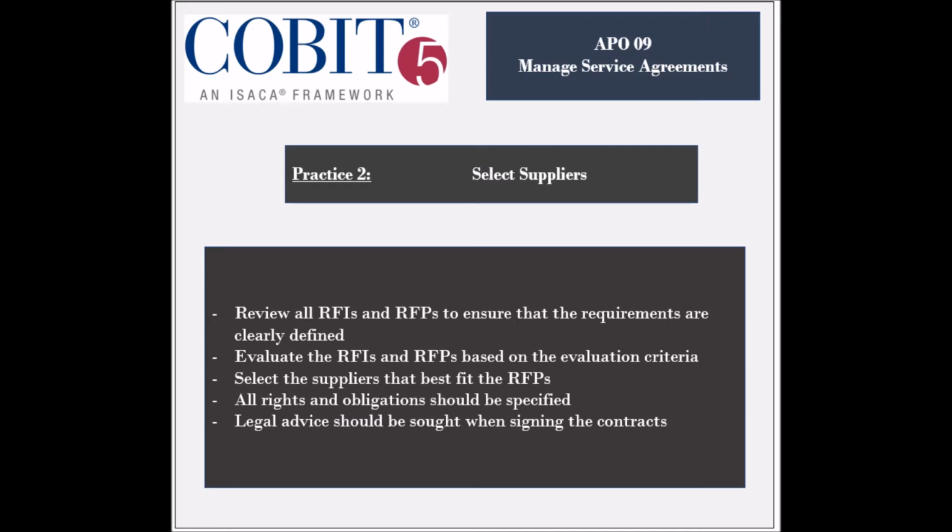The RFI and RFP documents should be evaluated in regards to the established criteria, along with verifying the references provided by the suppliers. The supplier that can best fit the RFP should be selected, the contract should be signed, and this process should be documented.